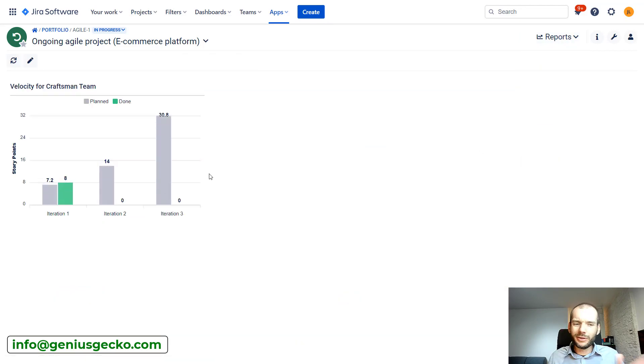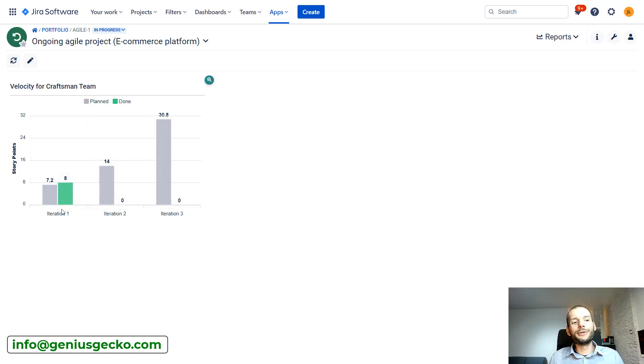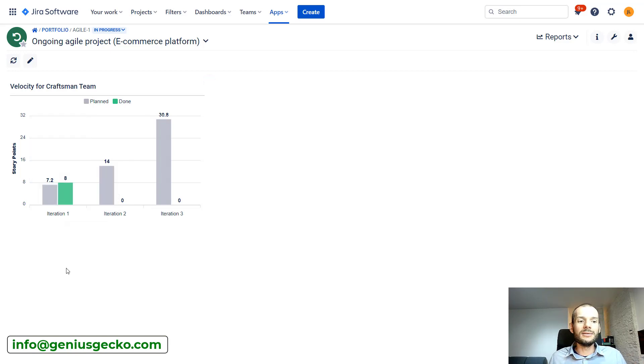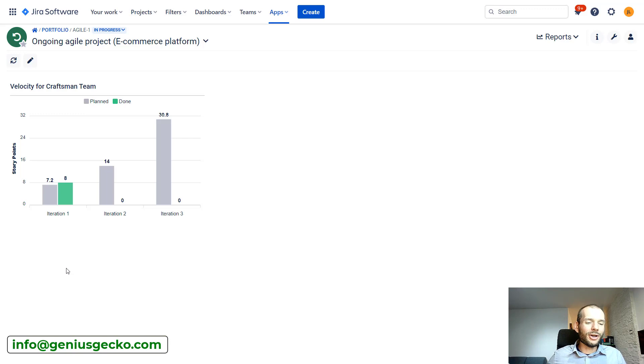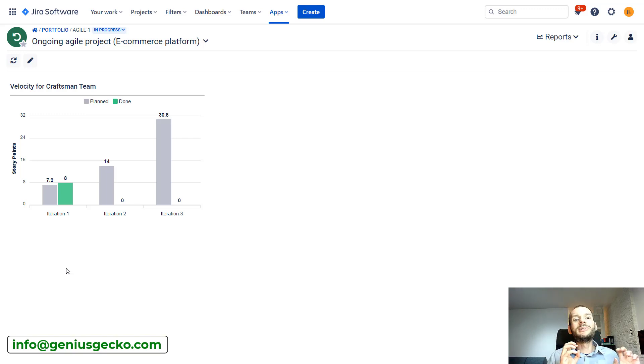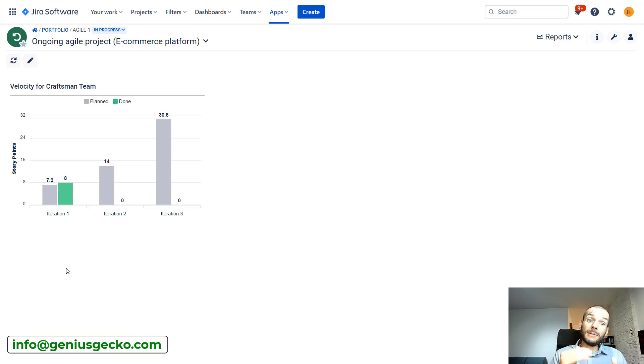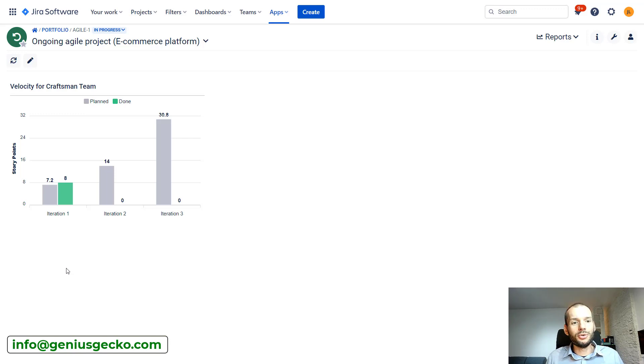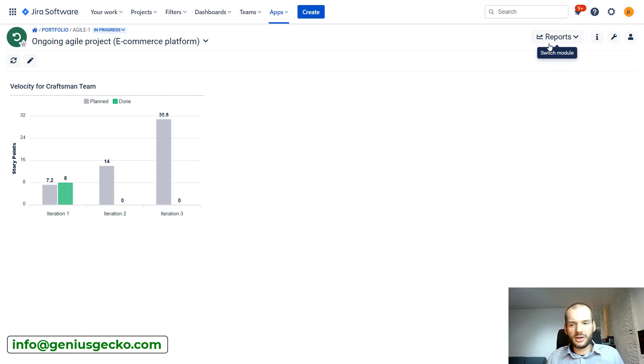We can go over here to reports. Mine will not be that full, but you can see over here that in iteration one I delivered eight story points out of 7.2 capacity. Probably you would like to make that decision based on more iterations. But let's assume that this is a trend. We are seeing that our team is delivering more than their capacity, even maybe more from iteration to iteration, because we are getting better at delivering stuff, working together, removing obstacles.